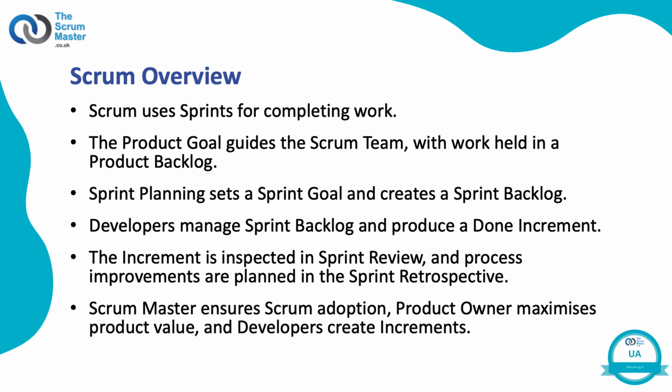owner is accountable for. Items at the top of a product backlog are refined to a ready state by the Scrum team so they are small enough, and enough is known about them, to allow them to be done in a sprint. The Scrum team conducts the sprint planning event at the beginning of each sprint.